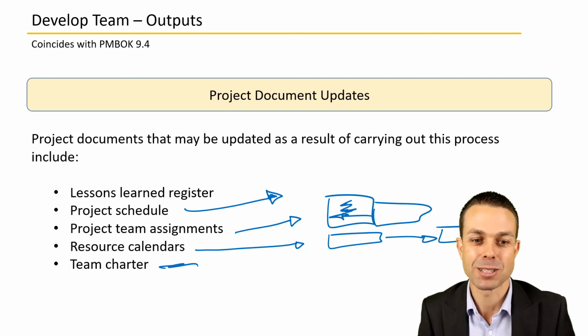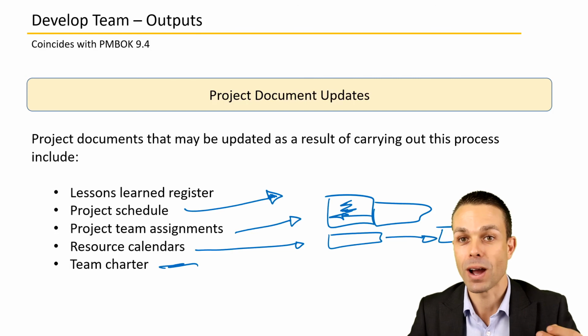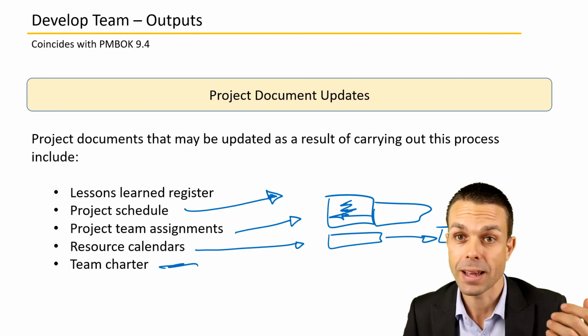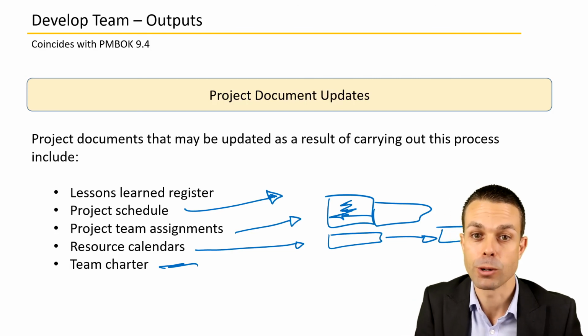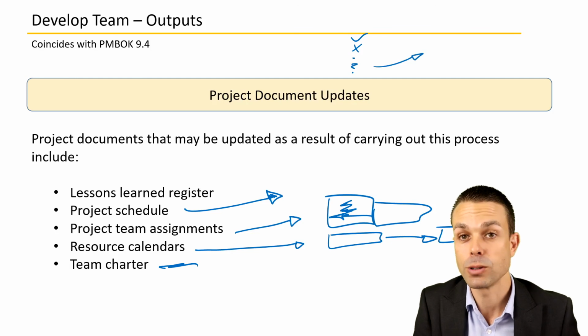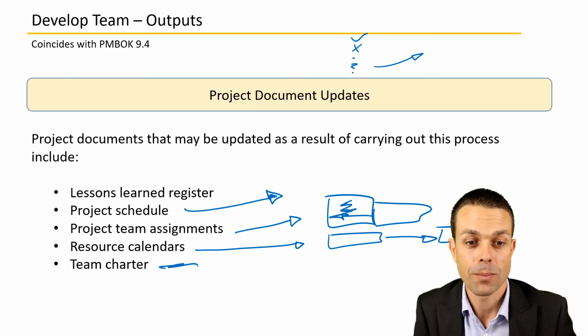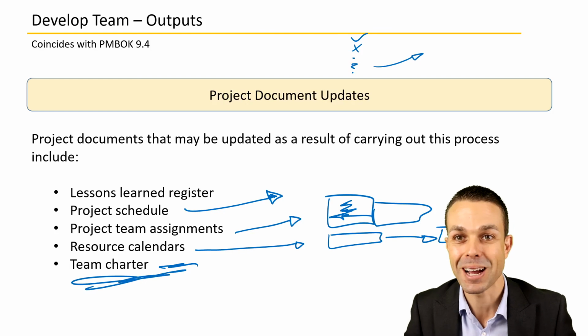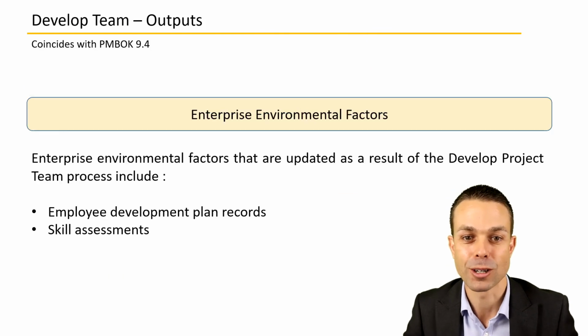And of course the team charter might need to be updated with our ways of work if we go through an agile retrospective, where we say what went well, what didn't go well, what puzzles me, and what have I learned, and maybe we feed that into our process to improve our way of work, and that impacts our team charter, so we're improving our way of work.